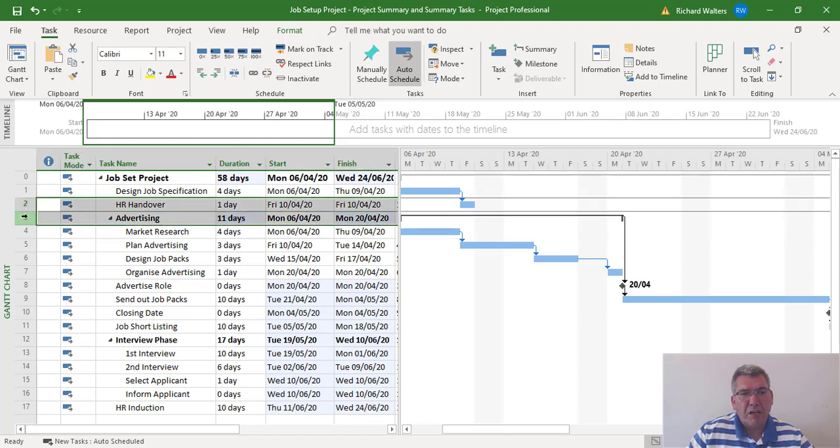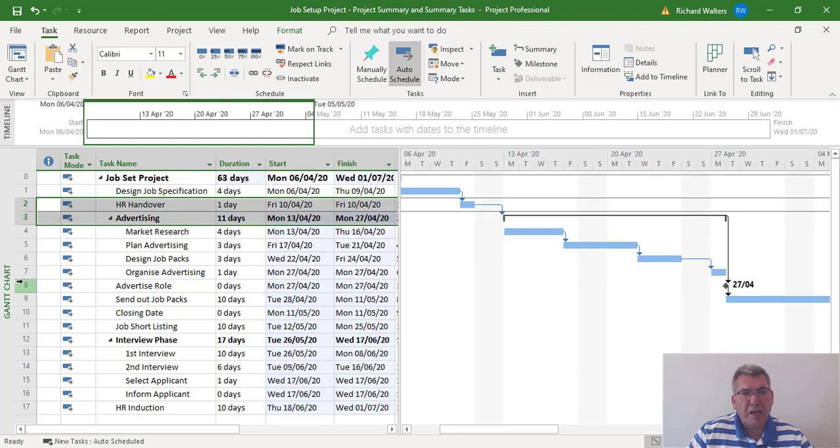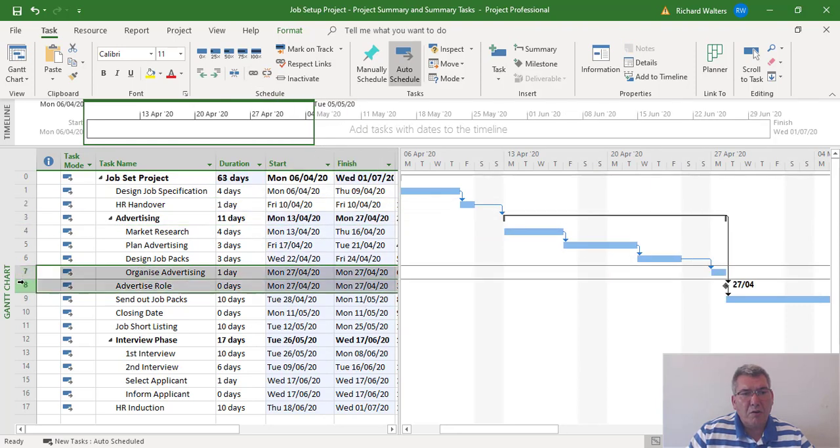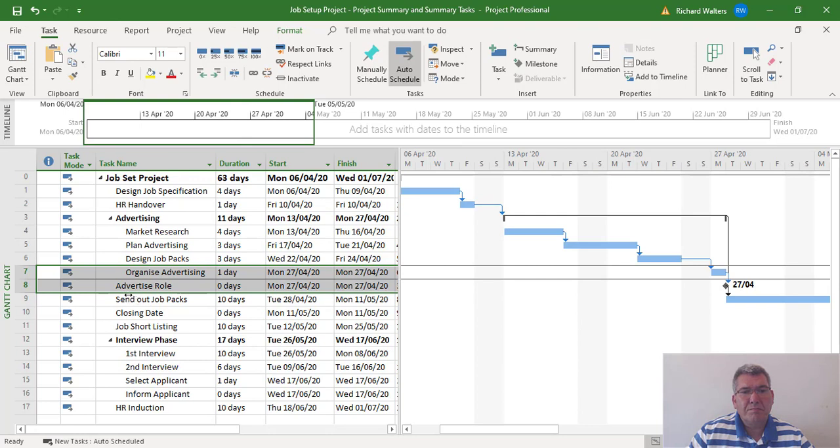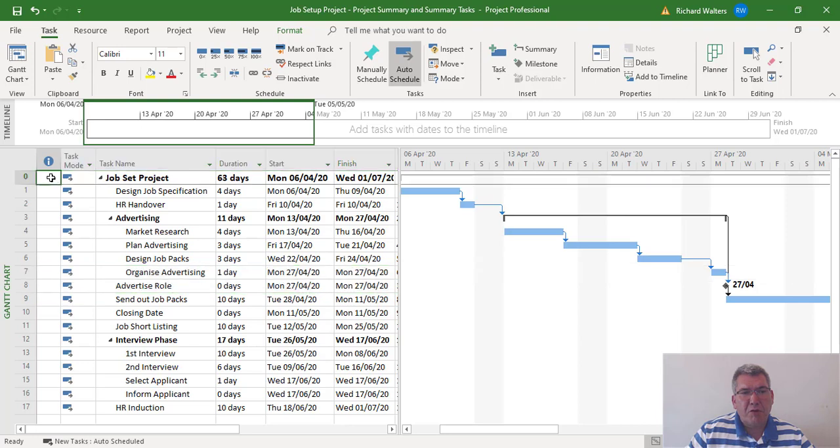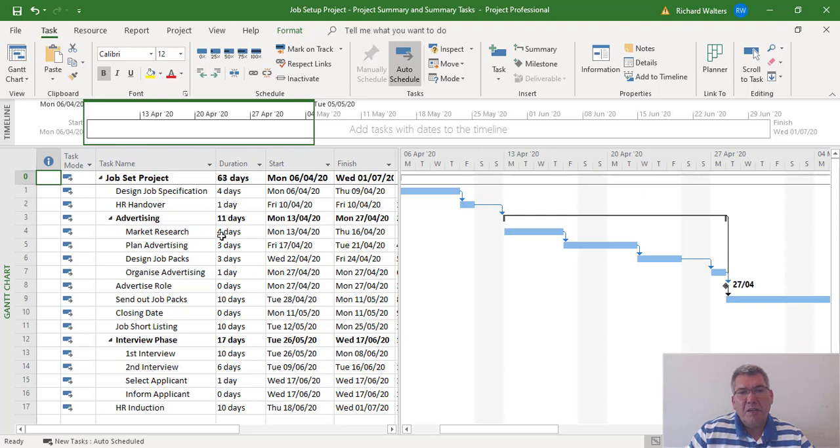So I'm going to reconnect two and three with the link, and also seven and eight. The original duration of the project was 59 days. We added in a brand new four day task, so that gives us a duration of 63 for this example.